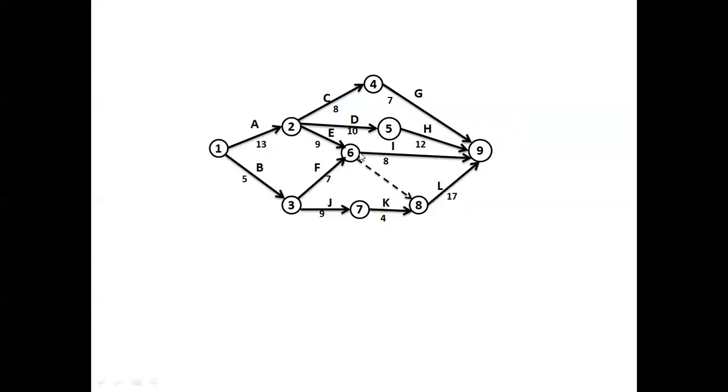Then when I remove the outgoing from 4, 5 and 6, and also this dummy, this will become the initial event, and the next number, 8, is given. Then the last event is given the last number, that is 9. I hope you have understood this.